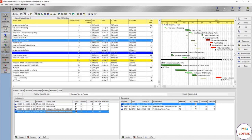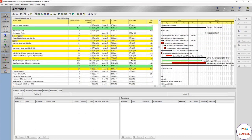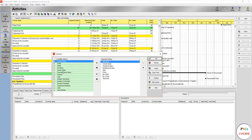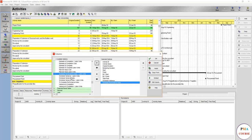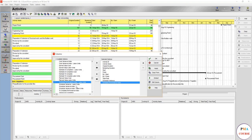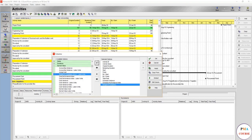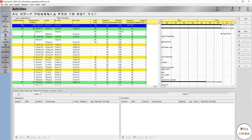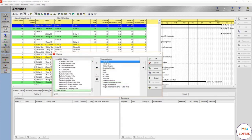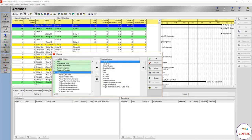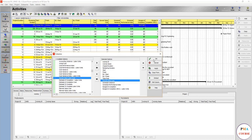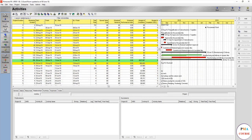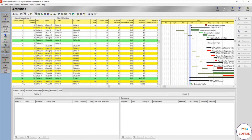Now you can review your update clearly. But what else can you see? You can show the earned values. You can show whatever you want to show. You can show the schedule variance, performance index, budget completion. But this one would show much better if you have everything ready. Schedule performance index, it's not that clear. Go back to your earned units, budgeted non-labor. Earned value cost would show here. Where is the earned value cost? It's zero. Why zero? Because the costs are only assigned for the construction.